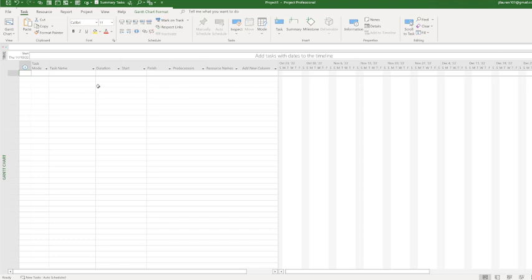You don't want to have your project file be manual, because when you're trying to figure out whether you are within the dates that your client is asking you, or a date that your superiors are asking you, or that was a contractual obligation, you need to be able to auto calculate. That can help you make adjustments as you need, versus when you do manual schedule, it doesn't do anything. And I can show you really quick.